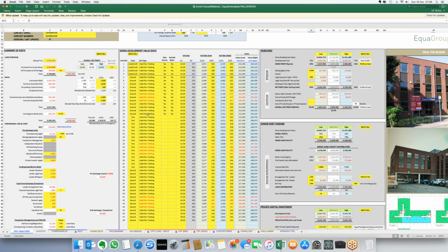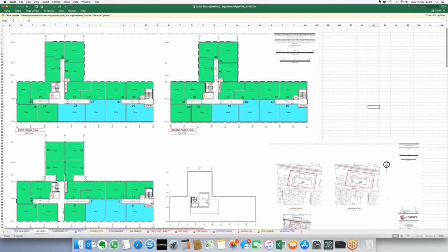Where do we start? Well, first of all, we'll go to site, we'll engage with our professional team, we'll undertake a detailed measure of the site, and then the professional team will go away and produce some space planning drawings, a couple of options, probably maybe 3 options in this case. So the architect came back, and I think option 1 was a full 1-bed scheme. Okay, so 1 bed throughout. I think we got up to about 55 units, something like that.